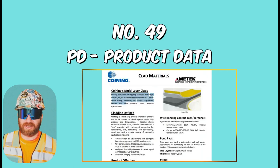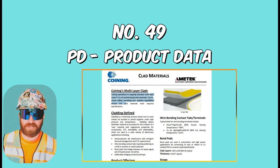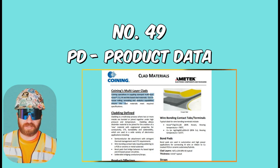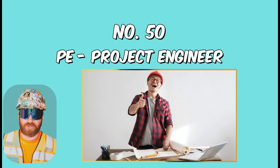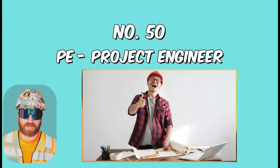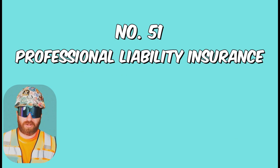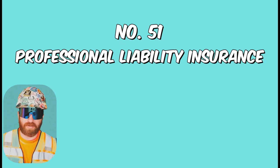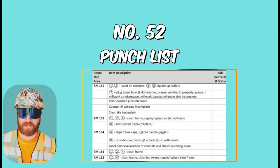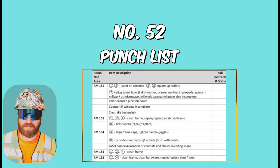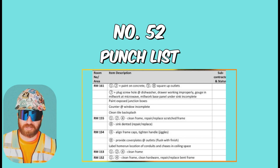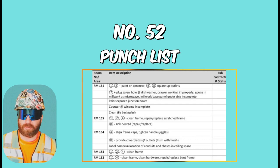PD just stands for product data — it's a type of submittal which is essentially the description of the material the construction team intends to use, reviewed during the submittal process to ensure it conforms with the project specifications. Project Engineer is usually a designation of an individual on the construction or design team, but not yet at the project management experience level. Professional Liability Insurance covers architects and engineers from negligence when producing construction documents, and is also highly recommended if you're completing delegated design as a contractor. Punch List is a checks-and-balance approach for the owner — the architect completes a punch list at the end of a project identifying items that do not meet the standards of the specifications, and it is the contractor's responsibility to correct those items.